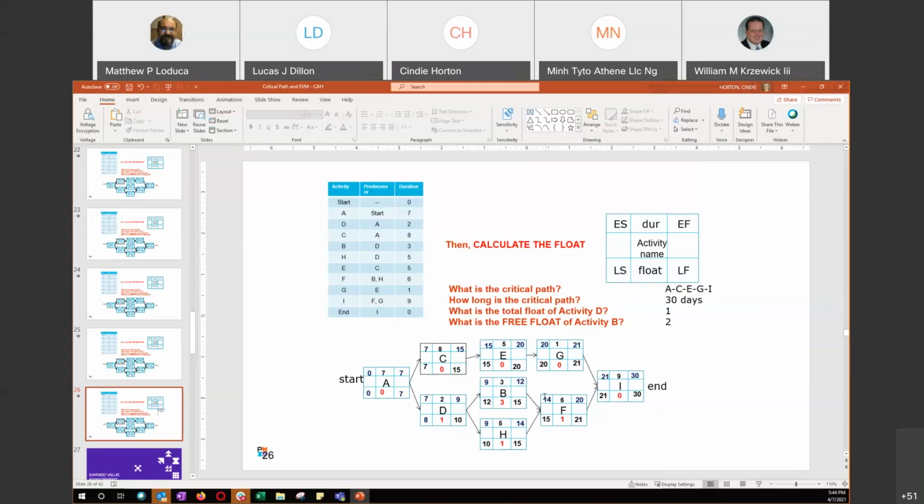So I'm essentially using my total float from B or on F to finish the project on time. When you're looking at B, you're starting late, but not late enough that F can't absorb it, so you end on time. If you delayed B by 4 days, F would not even start on time.